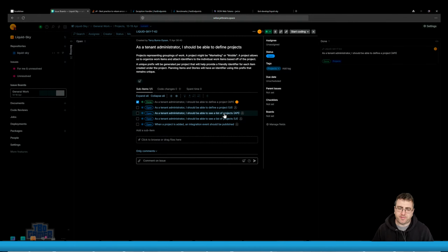So what you could do is if you're working on this in a team, one group could actually go off and do the UI because you can mock all the data, right? You could, especially using good principles, actually create a store that is temporary and provides you the data as if it's been invoked. So you can build everything up until the GraphQL endpoint, and actually just mock out a request there, providing data. So you can build the UI out given data, and then literally just wire the GraphQL query later, and you're good. So that's why I break these stories down into UI and API separately. The API is an independent piece from the UI, and always should be.